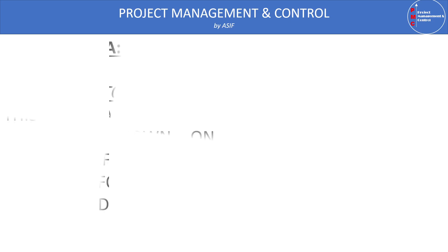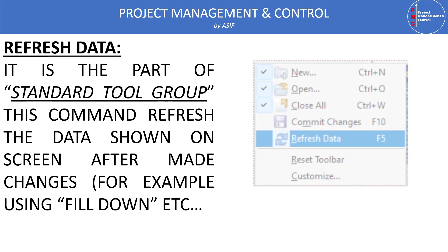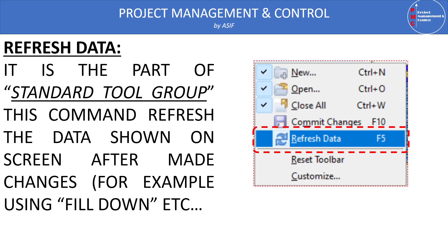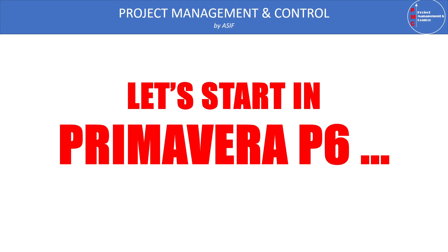And the next command is the refresh data. So this command can be accessed from the extended tool group or can be accessed by pressing F5. As we discussed before, the refresh data is used to show the impact of the changes we make using the fill down command. Because once we make the fill down command, the impact is not fully shown on all the data shown in the Gantt chart. So to show the impact we need to refresh the data using the extended tool group or just pressing F5.